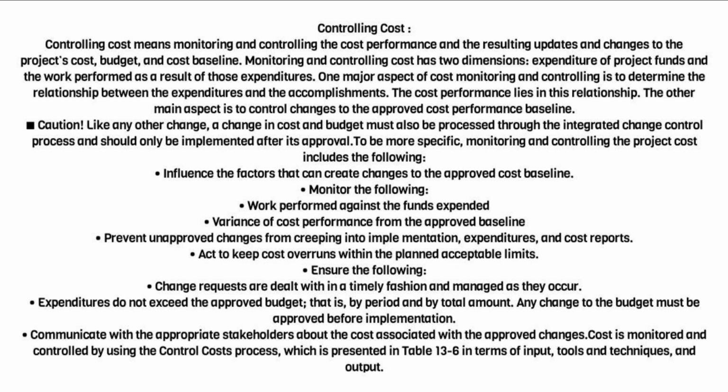Monitor the following: work performed against the funds expended; variance of cost performance from the approved baseline. Prevent unapproved changes from creeping into implementation, expenditures, and cost reports. Act to keep cost overruns within the planned acceptable limits.